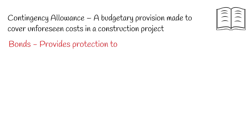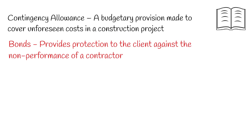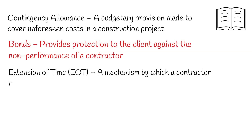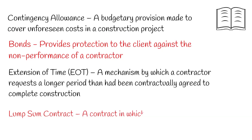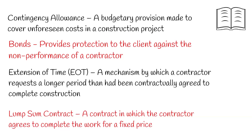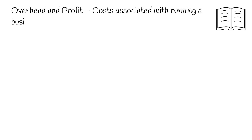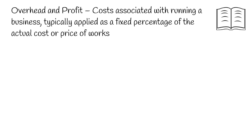Term 11. Bonds — provides protection to the client against non-performance of a contractor. Term 12. Extension of Time — a mechanism by which a contractor requests a longer period than had been contractually agreed to complete construction. Term 13. Lump Sum Contract — a contract in which the contractor agrees to complete the work for a fixed price. Term 14. Overhead and Profit — costs associated with running a business, typically applied as a fixed percentage of the actual cost or price of works.